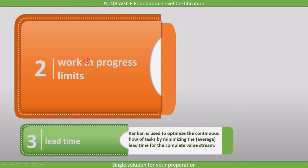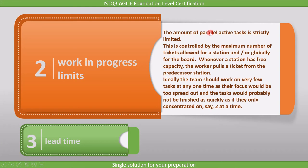The next instrument is work-in-progress limits. In Kanban, the amount of parallel active tasks is strictly limited. This is controlled by the maximum number of tickets allowed for a station and/or globally for the board. Whenever a station has free capacity, the worker pulls a ticket from the predecessor station. Ideally, the team should work on very few tasks at any one time, as their focus would be too spread out, and tasks would probably not be finished as quickly as if they only concentrate on, let's say, two at a time.